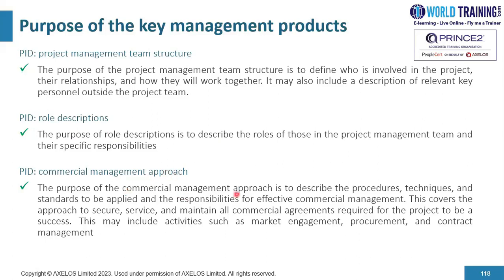And then we have another management product, which is the commercial management approach. The purpose of the commercial management approach is to describe the procedures, techniques, and standards to be applied and the responsibilities for effective commercial management. This covers the approach to secure, service, and maintain all commercial agreements required for the project to be a success. This may include activities such as market engagements. You might want to request for information, requesting for proposals, procurement, which would include doing those technical evaluations and signing contracts with the vendors. So all of those elements would be the scope of the commercial management approach.